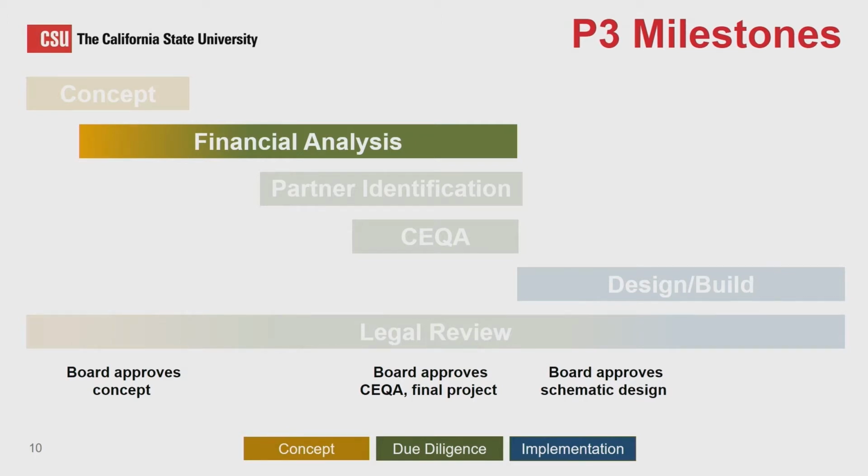We'll also look at the capital structure. Is the proposed partner looking to finance it with 100% debt, which adds more risk, or are they bringing equity into it? And if it's equity, is it their own equity, or are they bringing another equity partner into it? So we'll look at that. We will certainly take a close look at the projected revenues and expenses of the project to see how viable it is. Are those assumptions realistic? And we'll weigh that and test that as well.